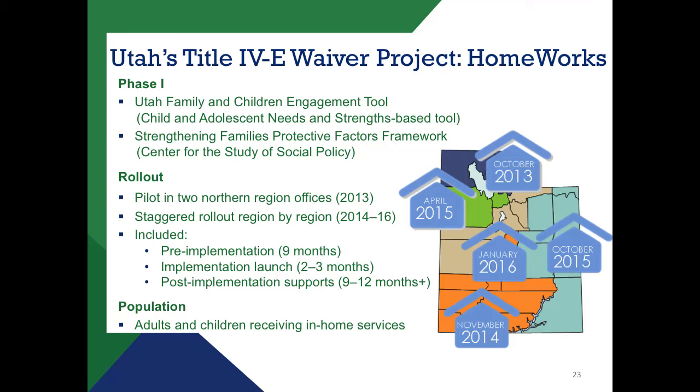The one thing that we did that was sort of an experiment, but we're really happy that we did, was we created an implementation plan that included a pre-implementation preparation period where we worked with the regions. We used a period we called implementation launch, just the kickoff, the training, getting it started, and then we developed post-implementation supports that we worked with our regions on. And we utilized this same process for all of our regions as we implemented this phase.